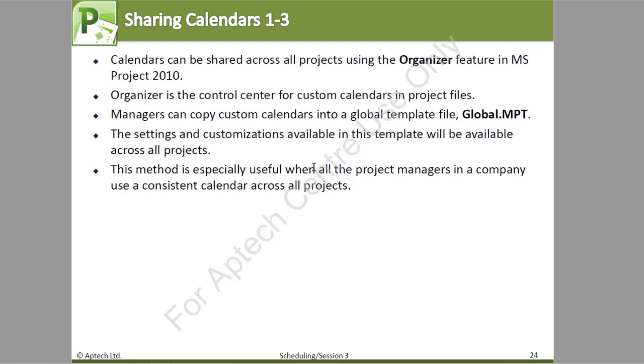Sharing calendars. Now, calendars can be shared across all projects using the Organizer feature in MS Project 2010. Organizer is the control center for custom calendars in project files, and managers can copy custom calendars into a global template. That is the global.mpt. MPT is Microsoft Project Template, and the settings and customizations available in this template will be available across all the projects. This method is especially useful when all project managers in a company use a consistent calendar across all projects.